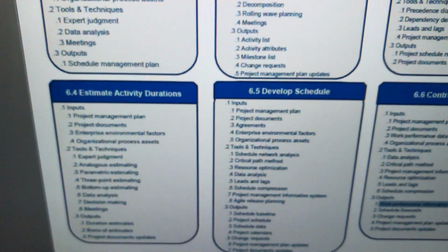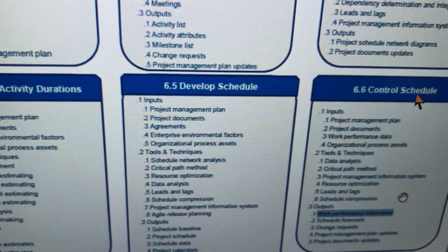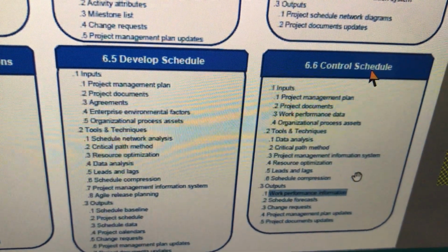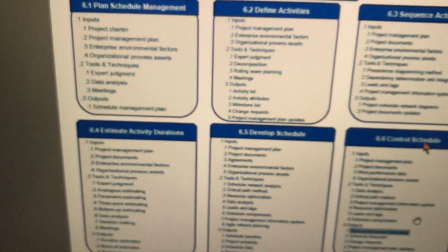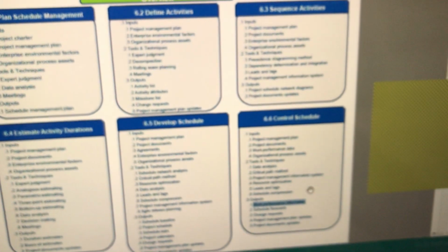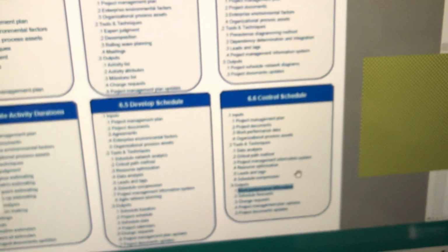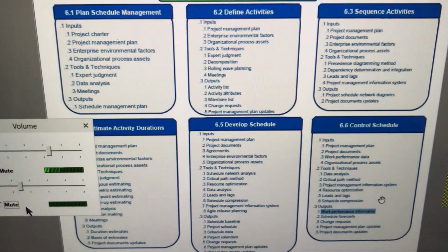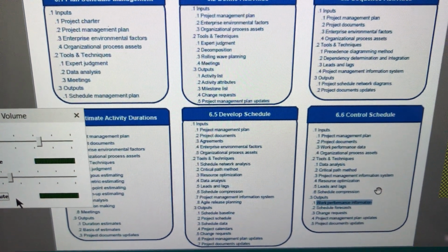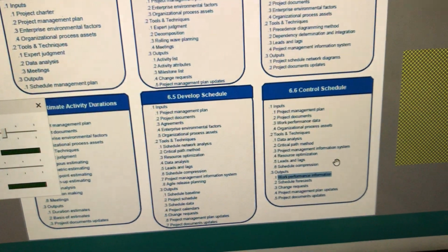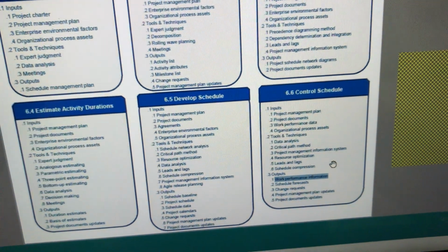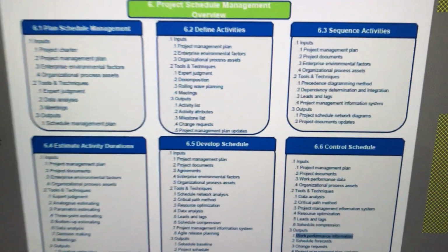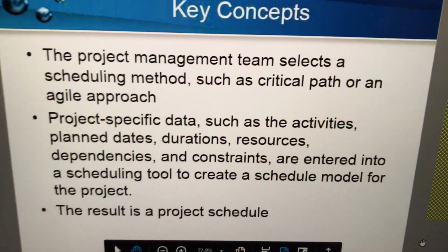Can 2 people write the same code? They cannot. Right? Code is to be written by generally one person. Maybe another person can write a module if the specifications are very clear. Again, that's why I say nature of the activity. But one code, only one programmer can write. 2 programmers can't write one code. It becomes inefficient and there will be a lot of errors because it's an intellectual piece of job. Okay, this is an overview of the schedule. Now let me move on.